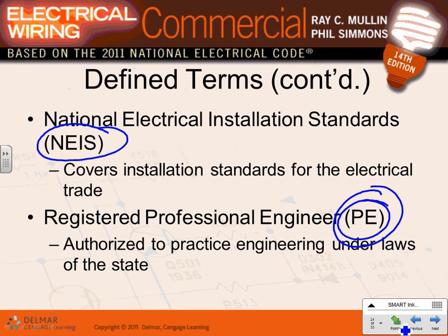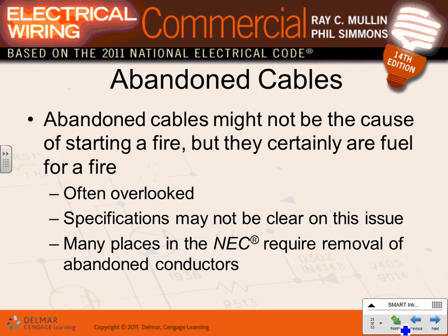A friend of mine does that. So then they fly you all the way to China to go into the factory and see how they make it, and they give you all the specifications about the equipment. You have to read them and understand them, analyze them, ask questions of their technicians, go witness their tests in their facility, and write a report. Your report will say, based on my judgment as a competent professional engineer, electrical engineer, I believe this equipment is equivalent to the UL listed equipment. Done. Then you can install it. Any comments, guys? And there's a list of names for the state of Minnesota that can do the professional engineer work.